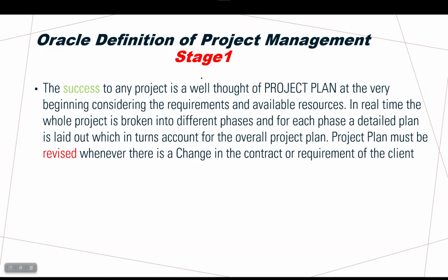But sometimes you cannot change or add, because, for example, there is a fixed timeline, or after this month the go-live will be, for example, the 1st of February or the 1st of March. So there is not enough time to receive changes from the client. Other than that, you can receive the changes, and it depends on the time remaining to deliver the whole project.